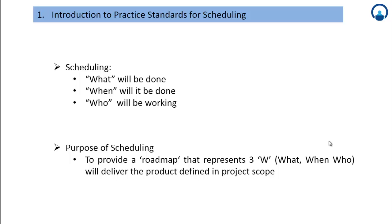Scheduling is one of the basic requirements of project management planning and strategic analysis. Its main objective is to establish the time required for a project, supporting the arrangement of funds and mobilization of resources in a cost-efficient manner. It also supports coordination within and across projects and enables early detection of problems so required actions can be implemented to achieve strategic goals. Schedule is also an important document used to record delays and analyze extensions of time and financial loss claims.